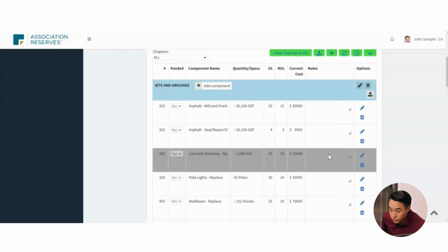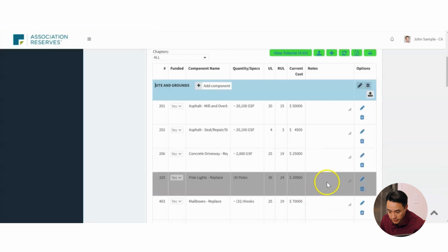One way to ensure that your requested revision gets due consideration is to also send any documentation or pictures that you have to your project manager for each component. I don't want you removing components. I don't want you to delete a component. Otherwise, I won't have any record of the change and we might miss it. So in order to get a component off your funding plan, you just have to remove the funding recommendation and put a note asking that the component be removed.